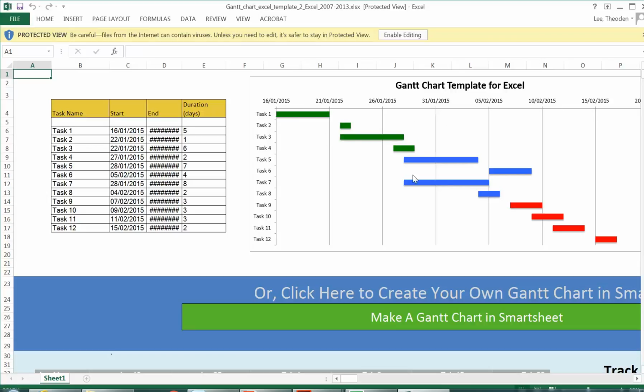And so then you can have these bars which give you an idea how all those laid out in a sequence and which ones need to happen sequentially, one after the other, and which can happen in tandem or at the same time, so you can have some of them overlapping. Now, this example is using some of the more advanced features in Excel, which will automatically generate a Gantt chart once you type in dates in this table on the left. That's a pretty useful approach, but one I probably wouldn't recommend at first if you're new to Excel.